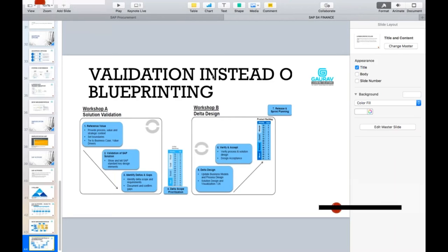Now, once you identify the gaps, let's say, just for example, 16 gaps. Out of 16 gaps, you need to identify which are more critical, which are less critical. You have to prioritize that, based on which gap you will try to solve first, which will come as a second priority, what will come as a third, and what will come as a fourth priority. So again, we see here there are 16 gaps in this example. Four are must, which are most critical. Then should, then could, then would. So this is the priority in which you will go ahead with the gaps.